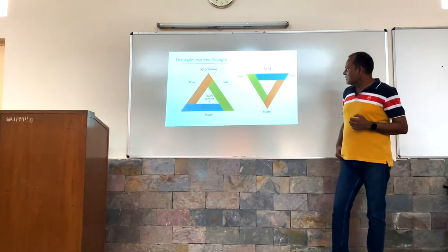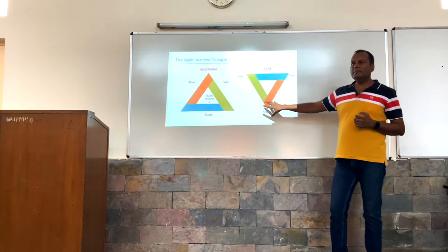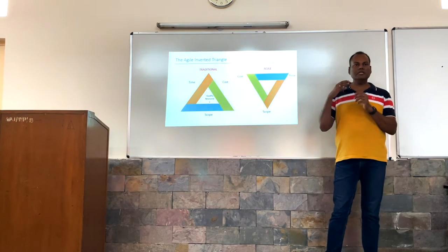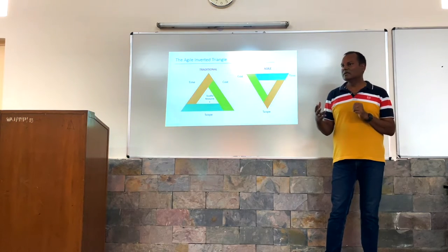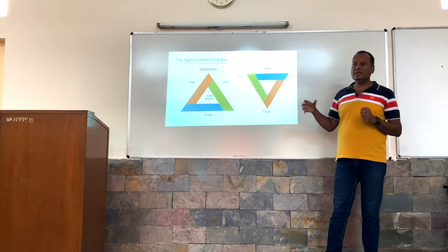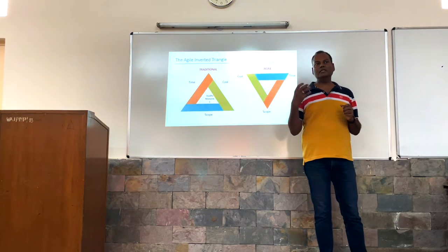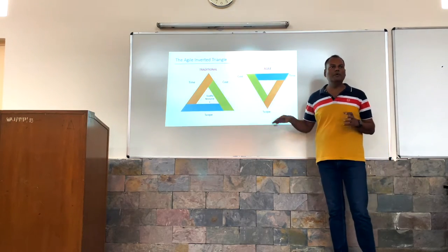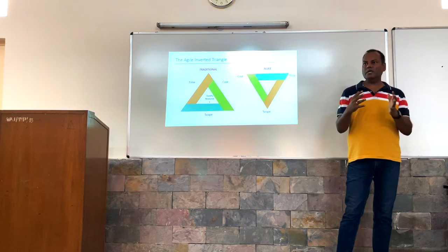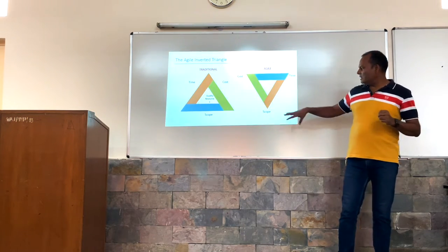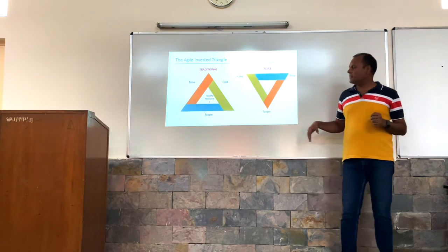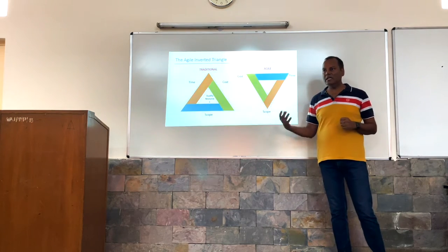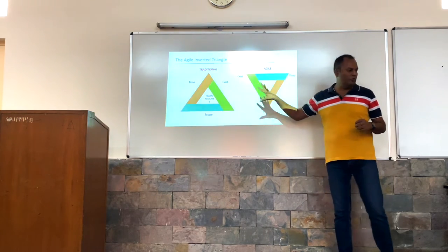Now they are saying the scope is not fixed. It can be movable. My cost and time should be fixed. If I say I have 6 months of time only, then we will complete my project in 6 months only. We will not increase it to 7 or 8 months. And if I fix the budget, because every company has a fixed budget, let's suppose I need to complete this project in 6 lakh rupees, then I will complete it in 6 lakh rupees only. But here I can change the scope. I will prioritize the work, what are the important things I need to complete first, and I will work on those items first. If my time permits and my money permits, then only I will do the remaining work which is not so important and does not provide a lot of value. So these are the two major changes.